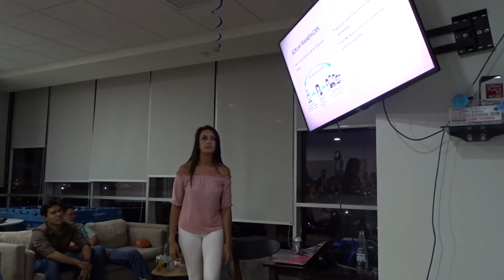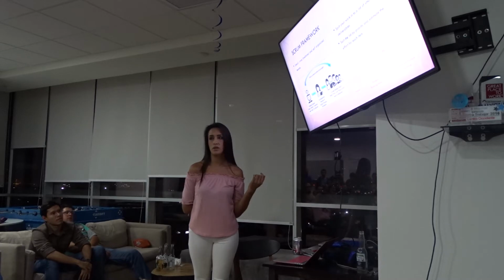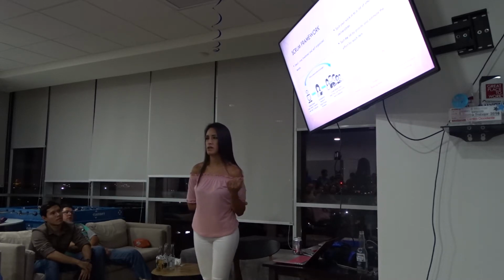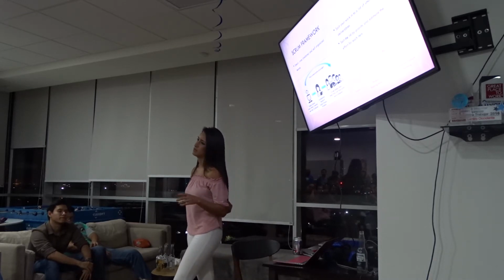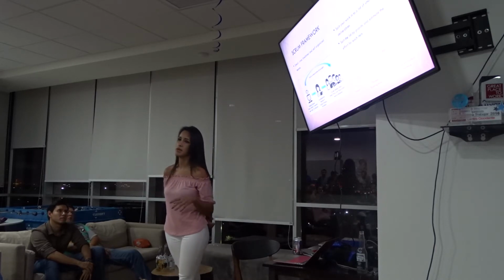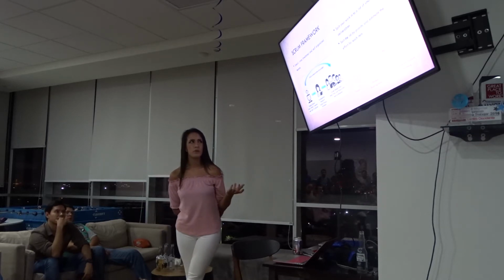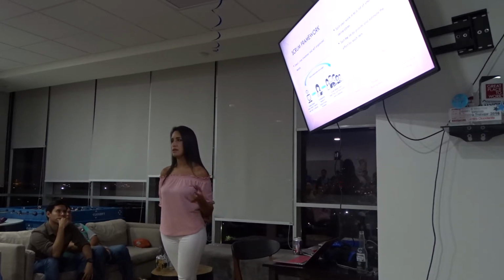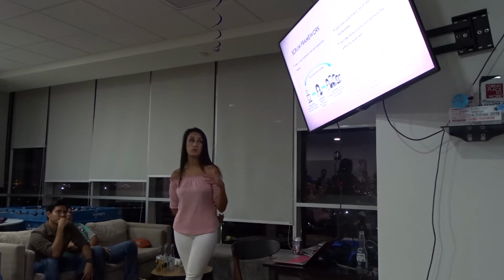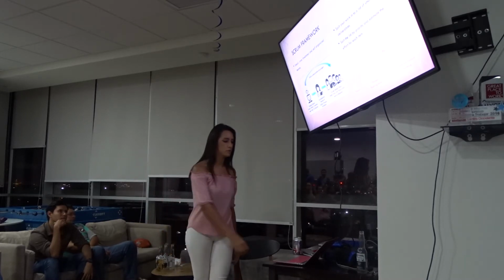We sort these small pieces of work by priority, and we estimate the effort for each one. I'm not sure if you used to estimate your effort in man-hours, like how many hours am I going to take for developing this project, say 80 hours or 10 hours. In the Scrum framework, as in the last image, the meme about story points, we estimate with story points. It goes 1, 2, 3, 5, and 8, to see how long I'm going to take for each of these work items or tickets that I have assigned.